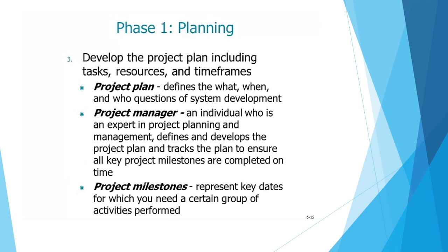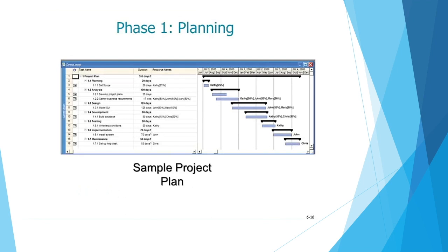And then you put together this project plan. So what's being done, who's doing it, what are the timelines, what is the budget, all of those things. What technologies are required, and put together the team, who is involved, who is going to lead the efforts, and what are the key milestones. You need small successes along the way.